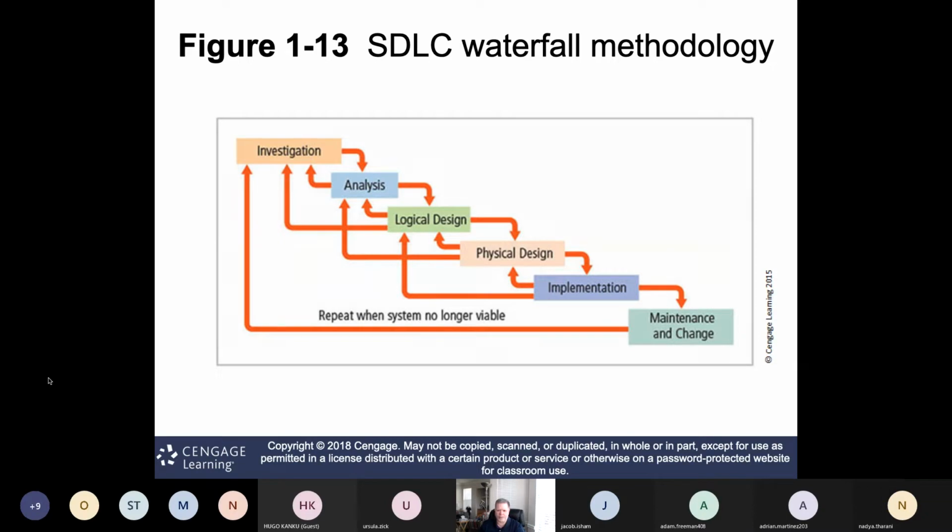Whereas in an agile approach, you may just look at the functionality on one web page and go through all 6 of these areas, and then you finish that, and then you look at the next functionality and go through the 6. And then eventually, after you've gone through this 1,000 different times, then you finally have the application.